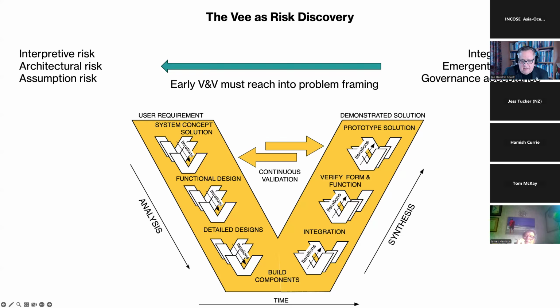So the initial idea was, well, there was a factory here before, so we take the factory down and then we build the 7-story building here, or how high we plan. But once they started taking the old building down and drilling and putting the big structure in, they realized that the substructure there is quite different from what the expectation was. And then things got stuck because people just assumed that certain things would be the same as what they saw just 100 meters up the road, I think.